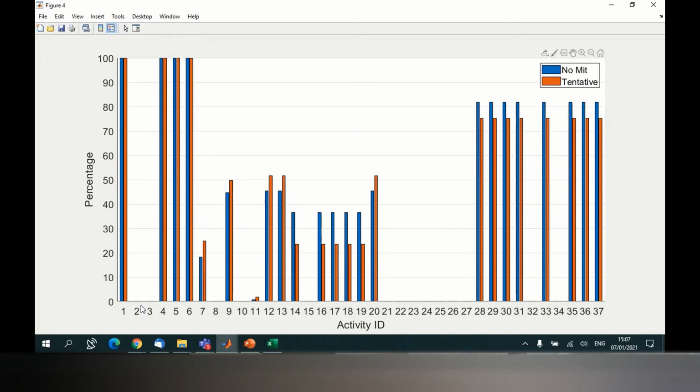So these are not really critical activities, so you don't really focus on them. You focus on the more critical activities, the 100%, and then less, and then less. It can just give you a kind of prioritization in your mind. What are the activities that are really critical, not the critical activities that you determine in a deterministic approach using, for example, the PERT approach or something. Those we call fake critical activities because they are misleading. They are telling you that I am critical, but when you do stochastic analysis, they turn out to be not really critical.